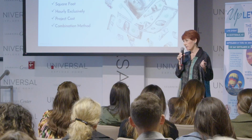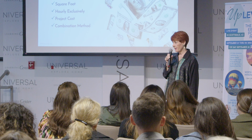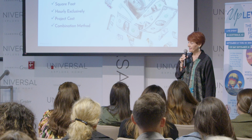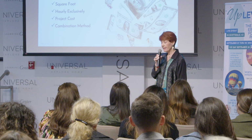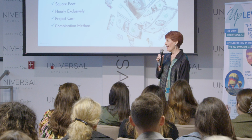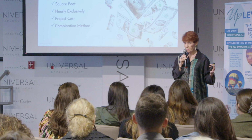So in my brilliance of 5 years in the field, I said, fine, I'll double my hourly. Well, our first time out of the gate, we went to ADAC, Atlanta Decorative Arts Center, and we went to Ann Sachs Tile. And this client, in 90 minutes, invested, listen to my language, language is everything, invested $80,000 and I made $450. Oh, okay. Now, never again. The minimum I would ever take as a procurement management fee, I don't call it a markup ever, is 15%.